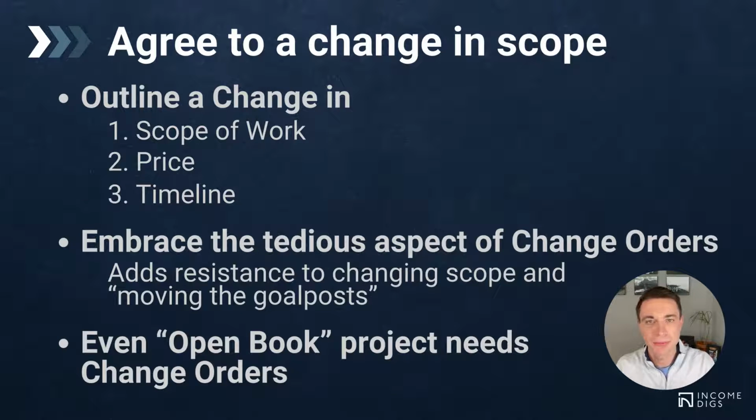So even with an open book project, we're still going to have an estimate, okay? And change orders, to me and to the industry and Buildertrend, really they're permission to change that estimate, okay? So we have our original budget, and then we have our revised budget. And the revised budget takes into consideration change orders. If we don't use change orders, our original and our revised is not going to change much. And then our total is going to be different.